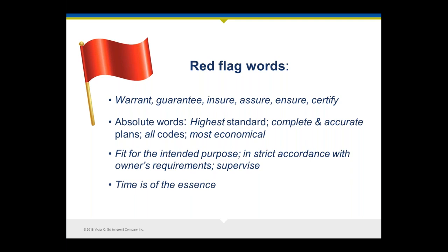'Time is of the essence' is another provision to stay away from in my opinion. That can be construed to convert any schedule slippage past a stated time constraint into a material breach of contract, so any minor delay could be used by the client as the basis for a claim for damages or justification for termination. Remember, the law only requires that you provide services with reasonable promptness based on specific facts and circumstances. Also, professional liability insurance only provides coverage for claims resulting from negligence — claims for breach of contract may result in an uninsurable exposure.